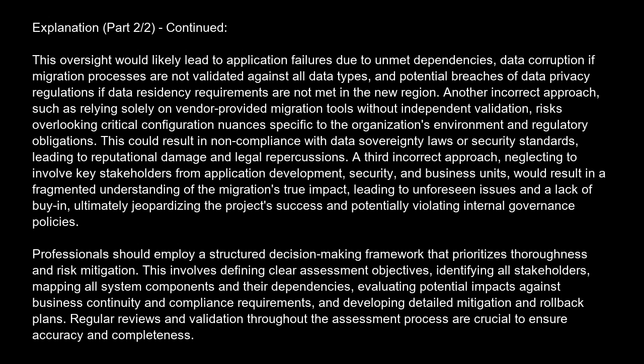This involves defining clear assessment objectives, identifying all stakeholders, mapping all system components and their dependencies, evaluating potential impacts against business continuity and compliance requirements, and developing detailed mitigation and rollback plans. Regular reviews and validation throughout the assessment process are crucial to ensure accuracy and completeness.